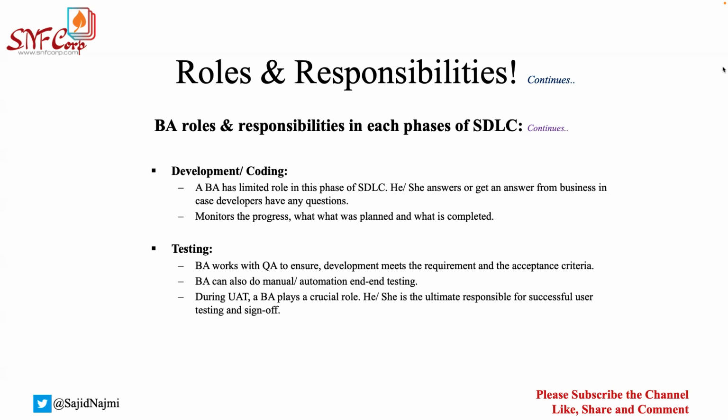We'll go through a change management process, a change request process. And probably this might cost you some additional time, some additional money, and all those things. And we'll take it forward. If you do not have the sign off, you do not have things written clearly, business will probably play with you and you have to do everything free of cost and with very close deadlines, and you will be in trouble. So don't do this.